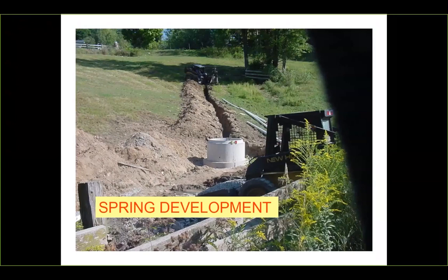Yes, there was a question, or maybe a statement, that the conservation practice code for water well is 642. One thing I wanted to talk about is that there is a difference between construction specifications and standards, and that needs to be well understood. With a conservation practice code, you need to follow the state rules and regulations for implementation as well. A lot of times states will have a different construction specification for a water well that will cover the requirements of the state during those installations. And that goes along with a lot of different practices.